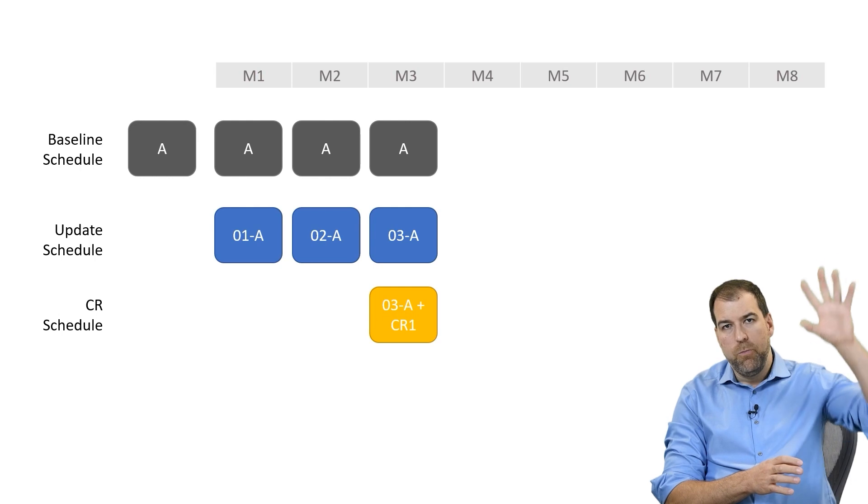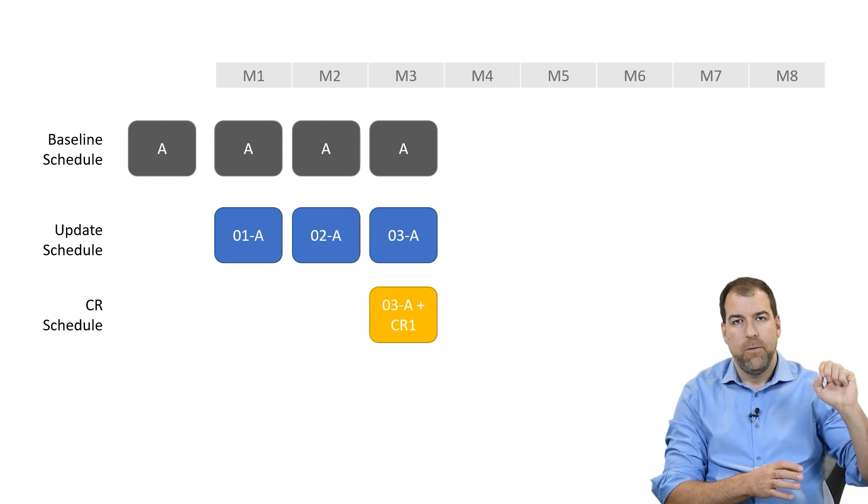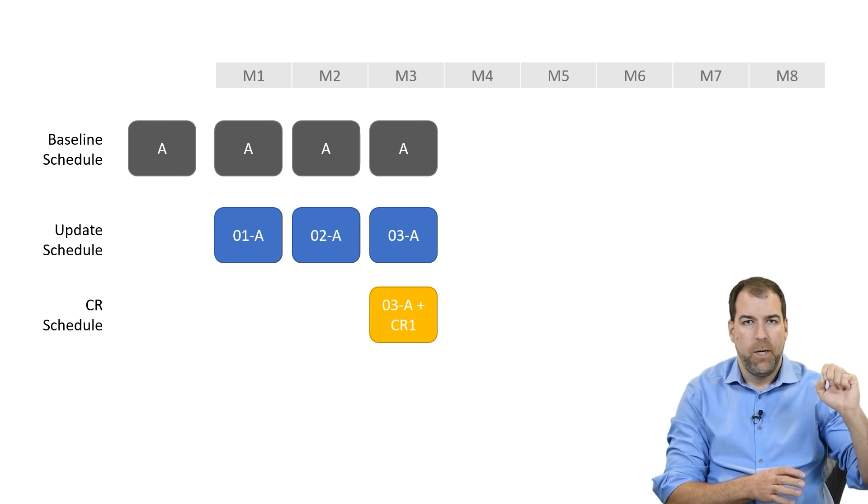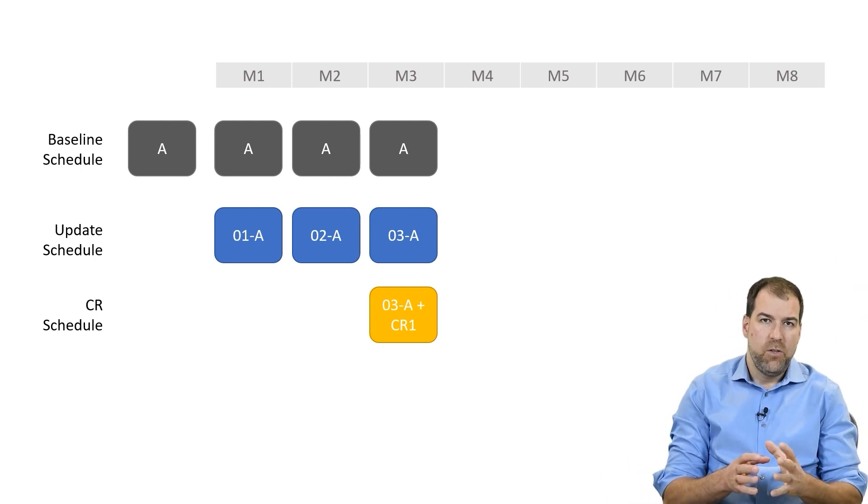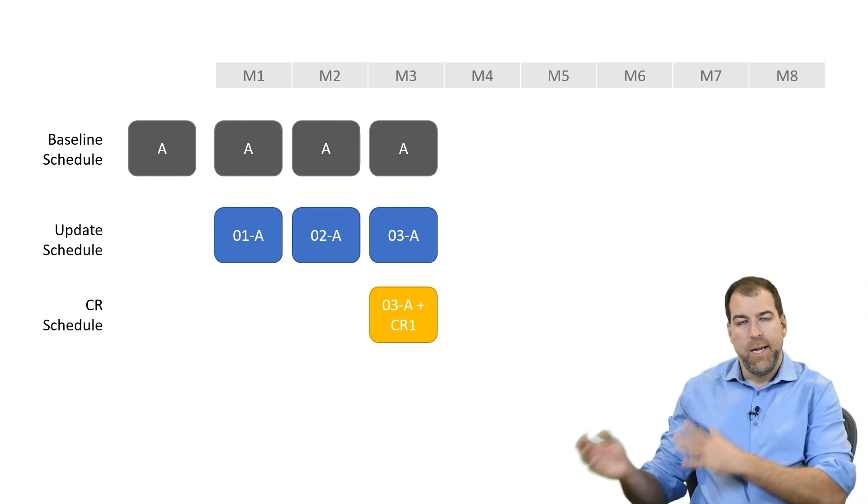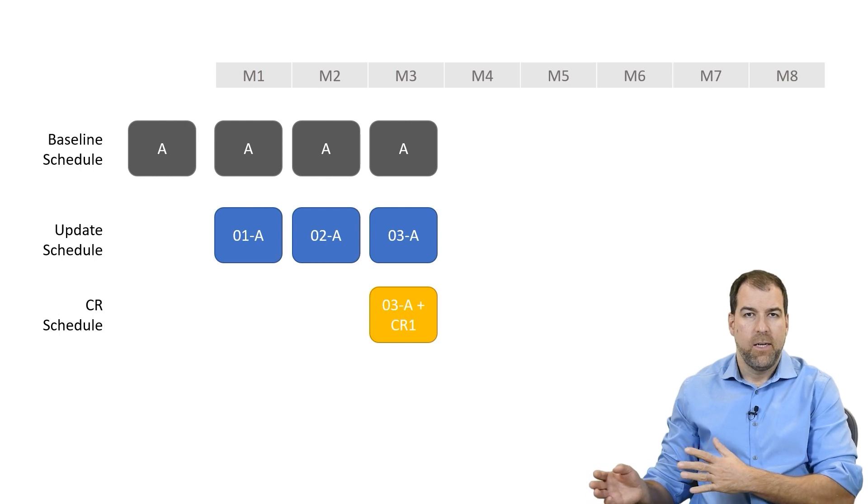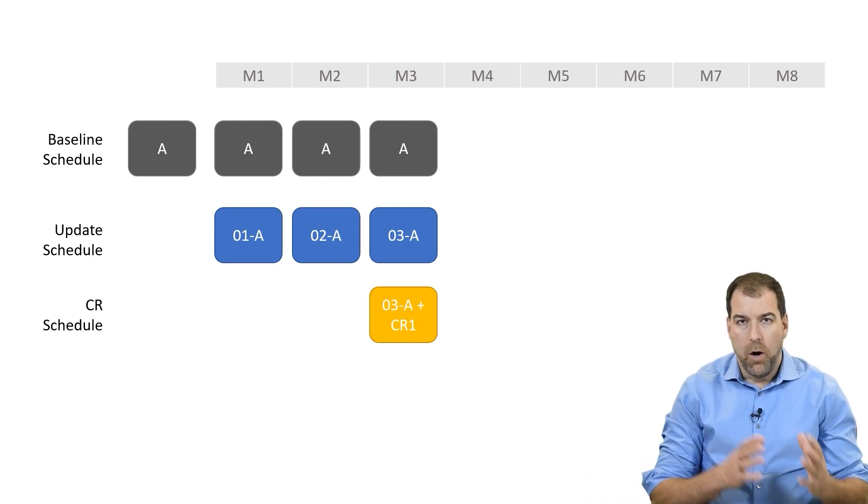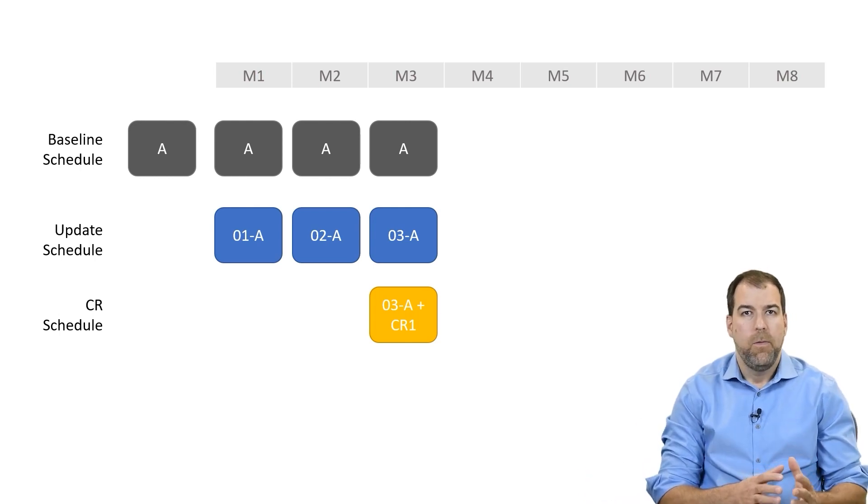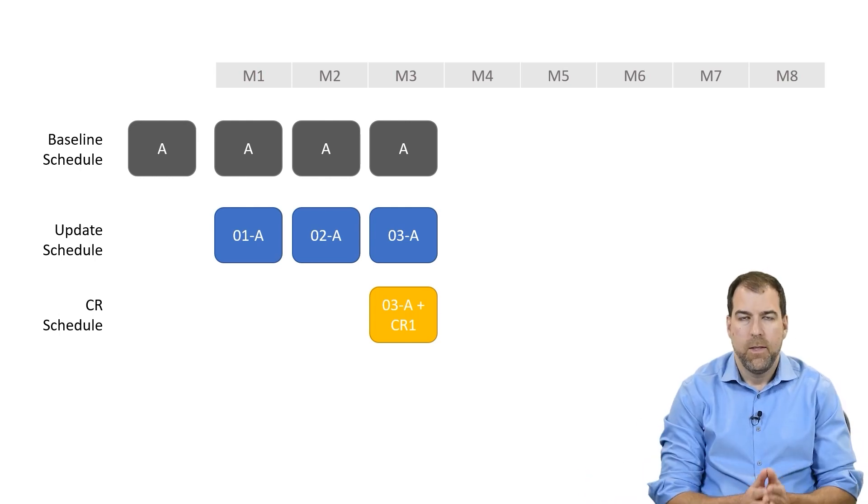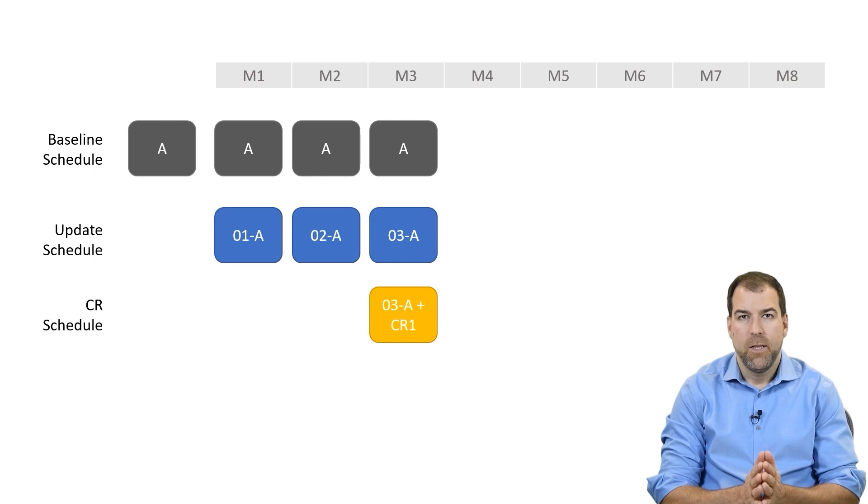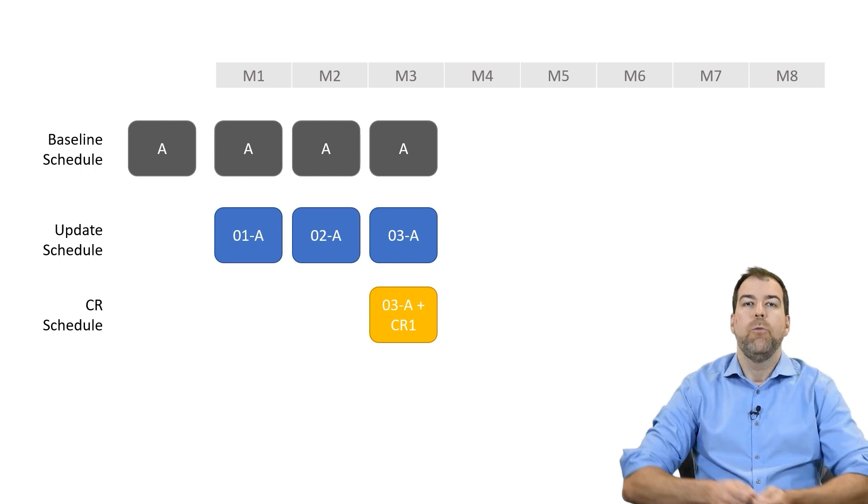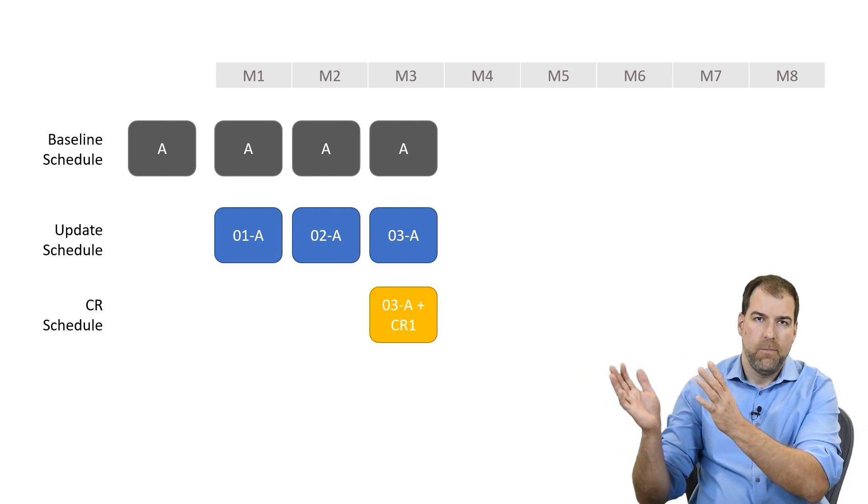We grab a copy of update 03. We add in the changes on the right-hand side of the data date that we think are going to implement that change request, and then we go and submit it.